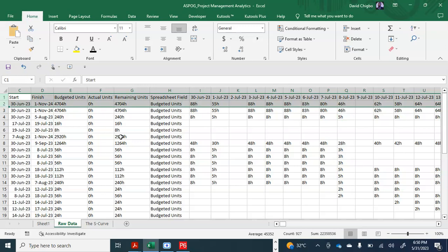Everybody, civil department, the whole scope of work is captured in the PC schedule. If you add everything together, because we're working 8 hours, but if you want to do 10 hours per day, because we put 8 hours budgeted units per time, that's why it's like this. If you want to do 10 hours per day, it will also reflect. That means we'll pick the cumulative man hours for the whole program. That's what this entails.